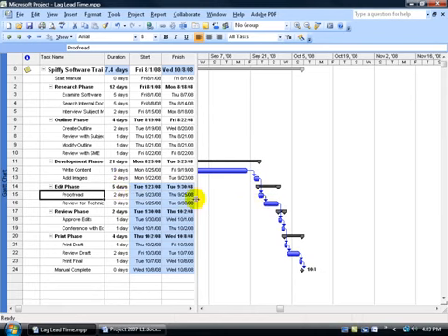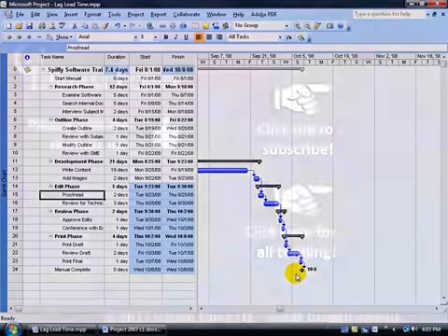So again, looking at here, it's starting a little bit earlier here, and I wouldn't basically go off that, but nonetheless you get the point that you can use percentages, or you can go ahead and use your hours, minutes, days, weeks, or months. And finally, you can see that the change is so minute, even a little lead time is not going to change the project time of October 8th. I'd have to have more lead time or have this task start at least a day early in order to bring my project date back a bit.